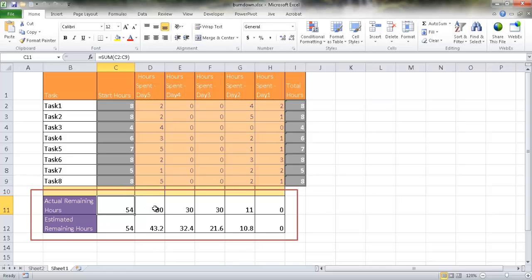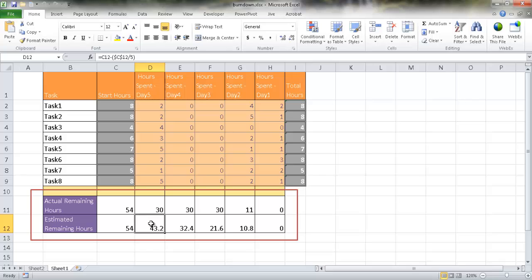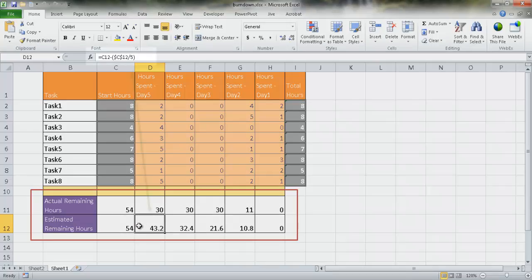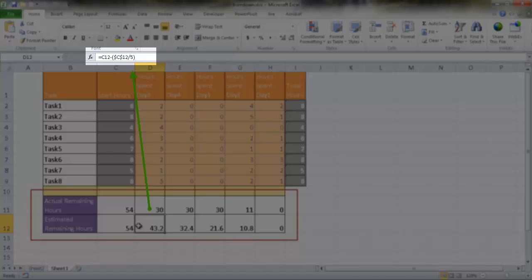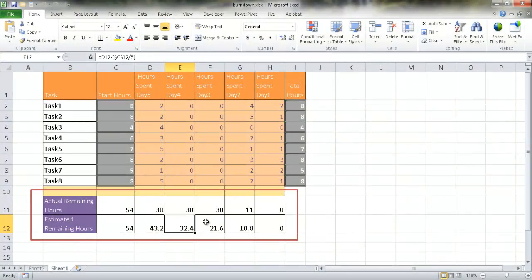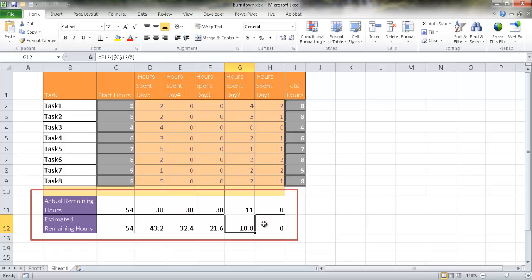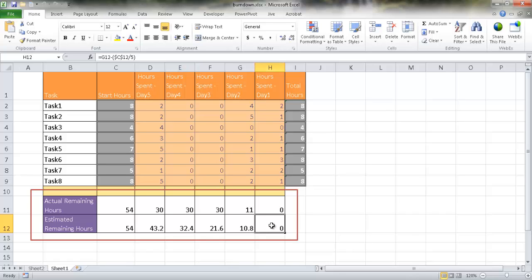Now when we go on to the additional days, day five, four, three, two, one, we're basically counting down from the fifth day to the first day. We want to go down to zero. And for each day, we're going to assume there's an equal amount of time that gets remained. So the calculations here, basically this is indicating there's going to be an equal space of when the estimated remaining hours are going to be spent. So as each day goes by, it's going to be about 10.8 hours that we're assuming these tasks are going to be spent. So 54 to 43.2 to 32.4, those are basically a difference of 10.8. So eventually we'll get down to zero. That's what gives us that linear line that goes all the way down from the top left to the bottom right.